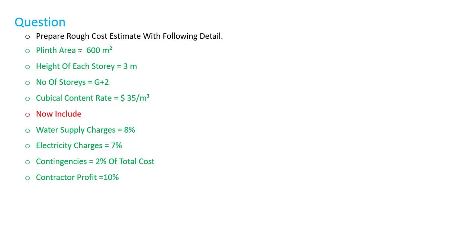Plinth area: 600 square meters. Height of each story: 3 meters. Number of stories: ground plus 2, meaning 3 stories. The cubic content rate is $35 per cubic meter.